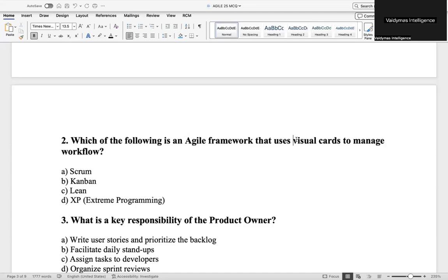Number 3 is that in Kanban, we have something we call just in time, continuous flow. Continuous flow means that your work must flow from what you have as to do to in progress, and you must ensure you complete it before you go and pick another job in to do. Unlike in Scrum, where we can have 10 stories in a sprint and not even complete them, we'll move them to the next sprint. They will say just 3 out of that 10 that you know you can do. That's the work in progress limit. Finish that 3 and go back and pick another 3.